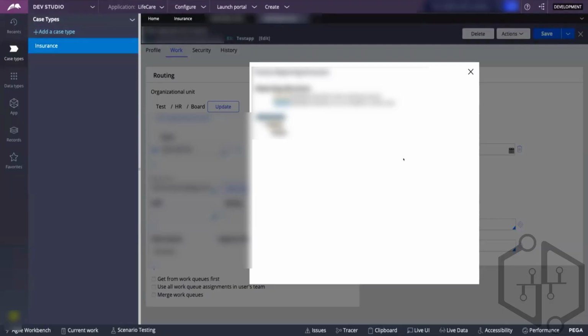But the authority matrix says, suppose after Harsha, directly administrator is giving the approval, or there is any other person who is not at all part of this reporting hierarchy. Maybe let's suppose we all are from the IT department, we need the approval from the HR department. So definitely the HR department won't be there in our reporting structure. So in those situations, we will use the authority matrix, where explicitly we have to give who should approve, when should approve, and why should approve.